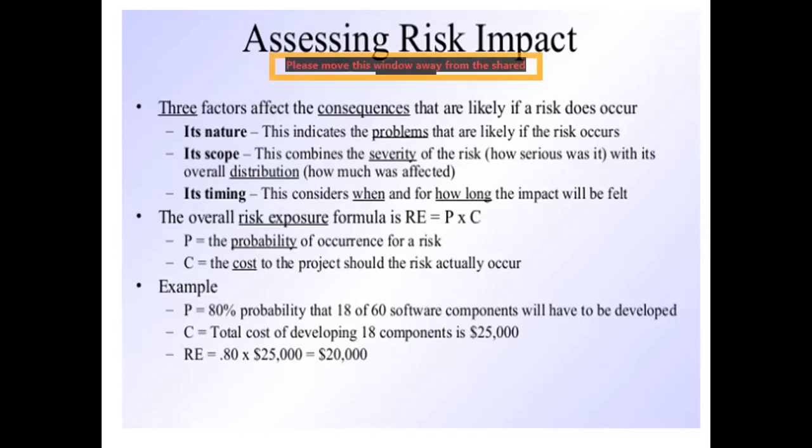This is money, because it will directly impact the cost of the project. It will affect the cost of the project. So either a need arises to reduce the staff or to extend the time to complete the project. We can say they are inversely proportional to each other. If we reduce the manpower, then it will take more time to complete the project.